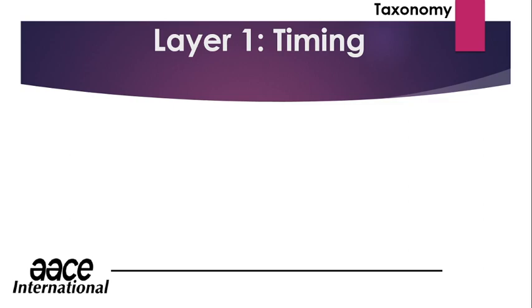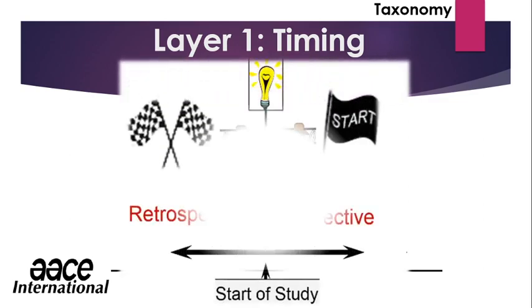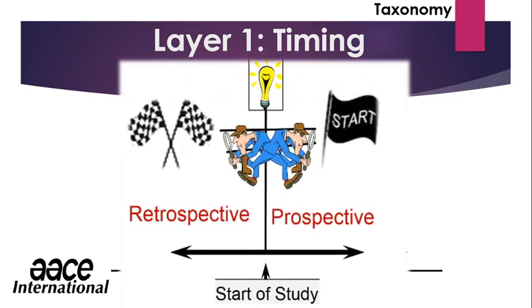This distinction in timing is one of the most significant factors in the choice of methods. Also, the timing distinction is often mirrored by a change in personnel. That is, often the forensic schedule analyst, who typically works in the retrospective mode, is not the same person as the project scheduler who worked under the prospective mode.